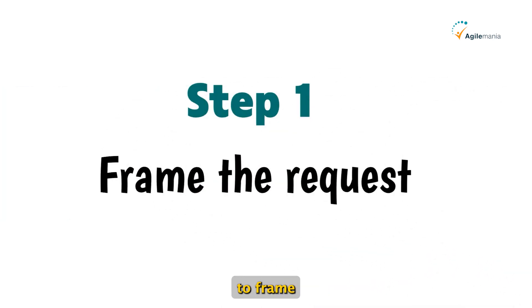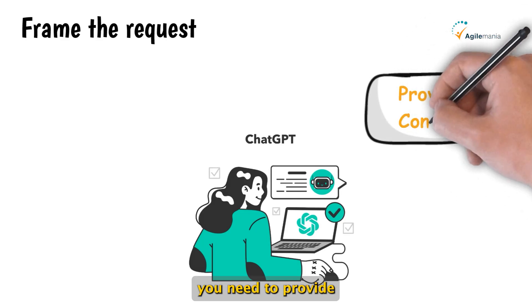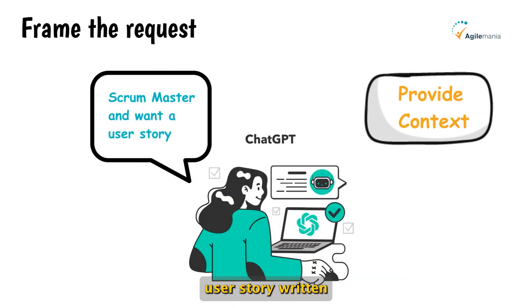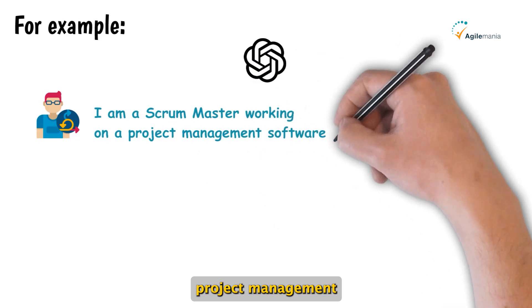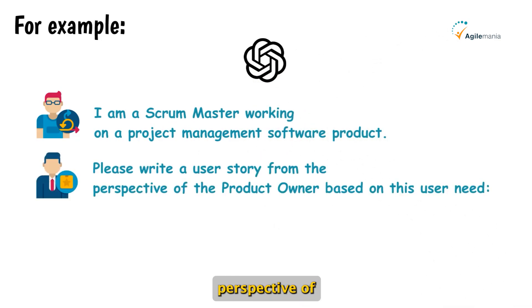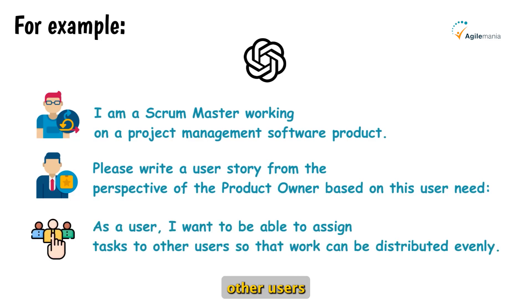The very first step is to frame the request. When prompting ChatGPT to write a user story, you need to provide some context. Explain that you are a scrum master and want a user story written for a software product. For example: 'I am a scrum master working on a project management software product. Please write a user story from the perspective of the product owner based on this user need: As a user, I want to be able to assign tasks to other users so that work can be distributed evenly.'